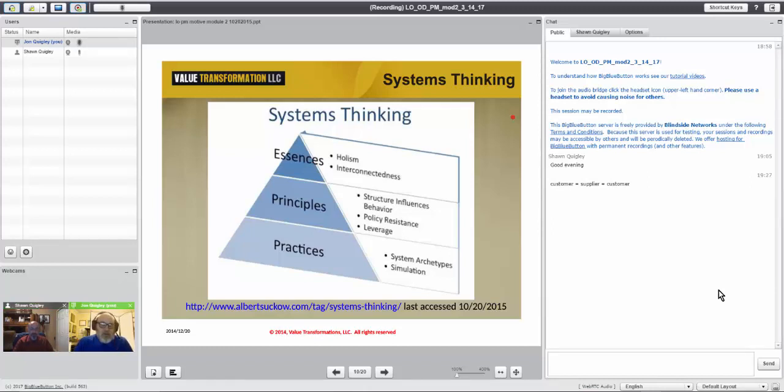Yeah, and if you look at that PMI calculation for communications channels, you can see that as the number of people grows, the communications channels or opportunities grow rapidly, and being able to manage that gets to be really bad. It's the equation. If you look at the equation, look it up online if you're interested. You'll see that even a small group of 10 has a really ridiculous number of possible communications channels.